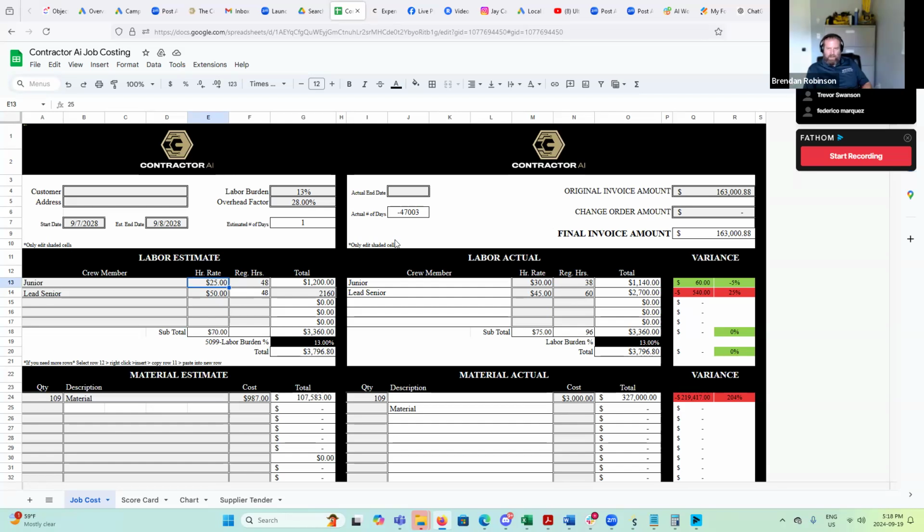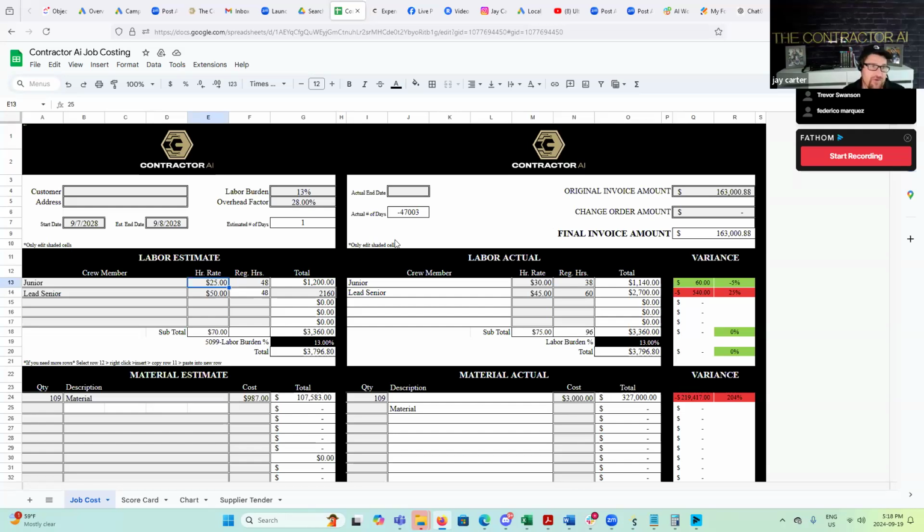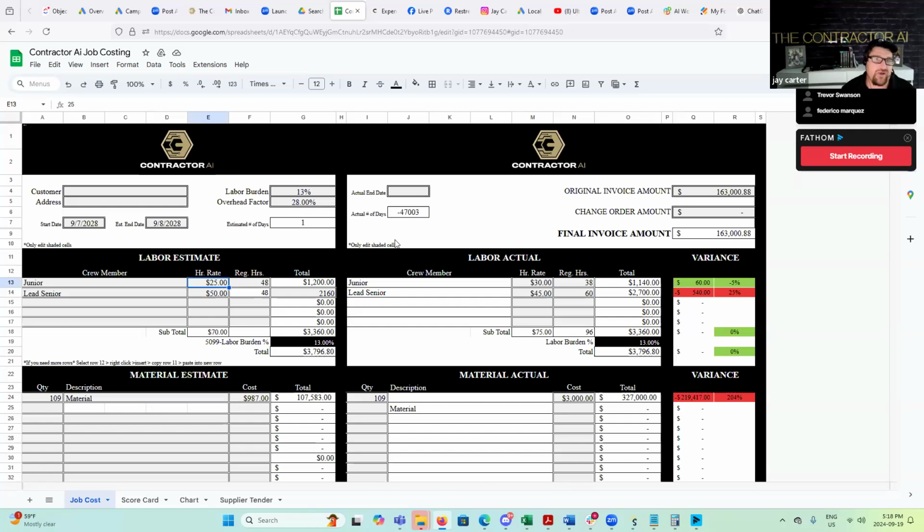It's all the stuff you have to pay that you don't pay the person. Right, everything after an employee's wage. That can be a whole bunch of things, and I have a calculator for figuring out your labor burden. But let's say you've got taxes, uniforms, all these extras that go into an employee, as well as holidays, all these other things that increase the hourly rate.